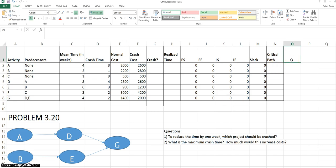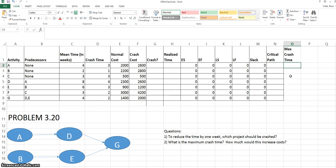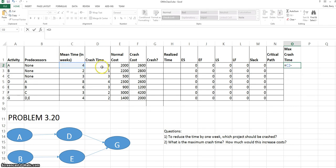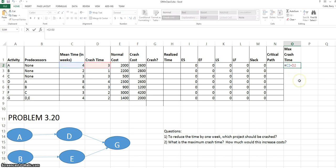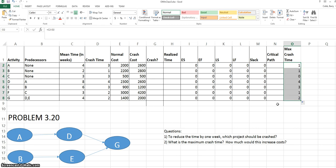To find the maximum time that the project can be crashed, we need to calculate the maximum crash time for each activity as the mean time minus the crash time. We interpret this, for instance, for activity A as the normal time to complete the project on average is 4, but if we crash the project it can be completed in 3. So the activity can be crashed by one week. This formula is the same for all activities, and we can copy this down. We see here that one activity has a maximum crash time of zero, so there's no opportunity to crash that project.